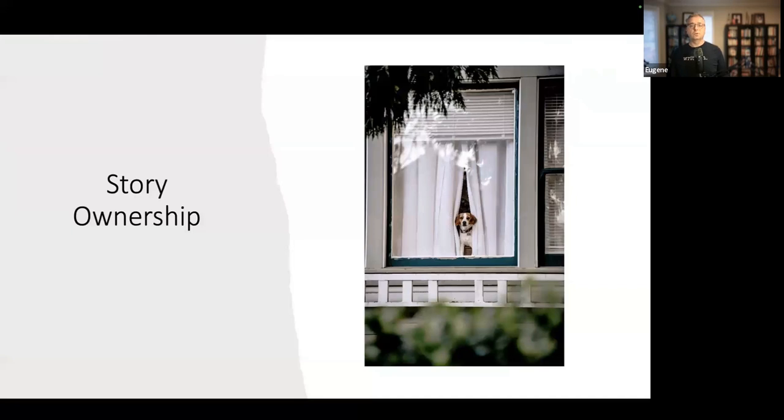Next one is around story ownership, right? This is a specific technique that I use on my team, where not everybody can own the whole team and not everybody can actually be the CEO of IMDb, right? Going back to think like a CEO. But what we do on the team is, as stories come into our backlog, we assign a story owner. The story owner is the CEO of that story. Their responsibility is to understand the full business context, work with the PM, understand all the requirements, do the design for that story, do the thin slicing for that story, and then drive that story through execution.